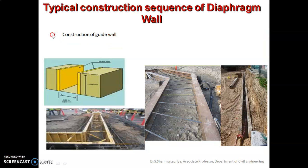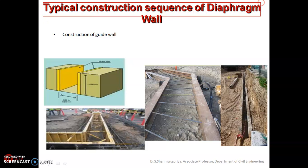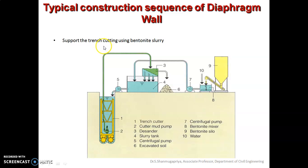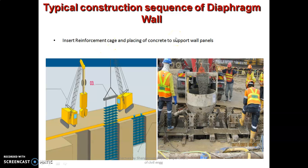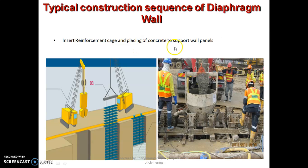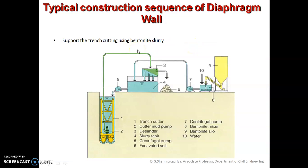Now let us understand the typical construction sequence involved in the construction of the diaphragm wall. The first step is the construction of the guide walls. The second step is excavation to form the diaphragm wall trenches. The third step is supporting the trench cutting using bentonite slurry. The fourth step is inserting the reinforcement cages and placing the concrete to support the wall panels.